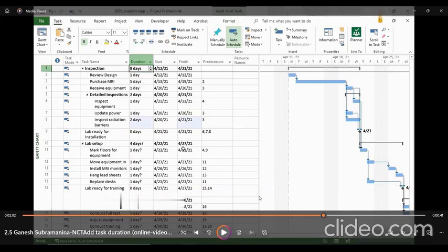So far what we did are exact days we know. Task 11, for example, I know it will be around 5 days, but I'm not sure exactly 5 days or not. So I can mention 5 days with a question mark when I'm not sure about the exact number of days. And when I press enter, now I have 5 days with the question mark.